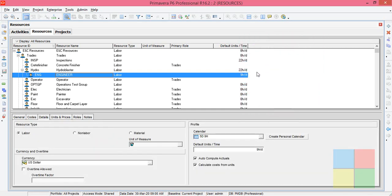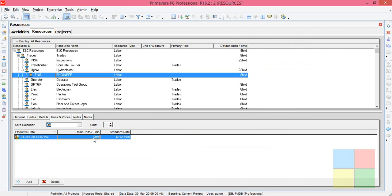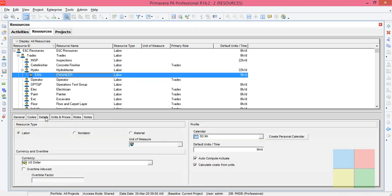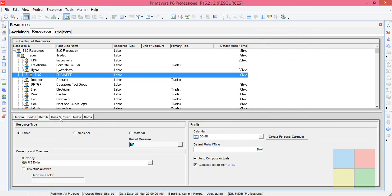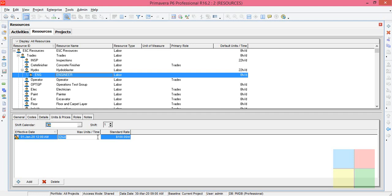So in this case I'm going with 8 because we have only one engineer. Just imagine if the calendar was 5 Day 9 Hour, then two engineers means 18, three means 27, four engineers means 36. This Maximum Units Per Time represents the maximum availability — how many engineers or any labor we have per day. I'll go back to 5 Day 8 Hour and set it to 16, which means we have two engineers.